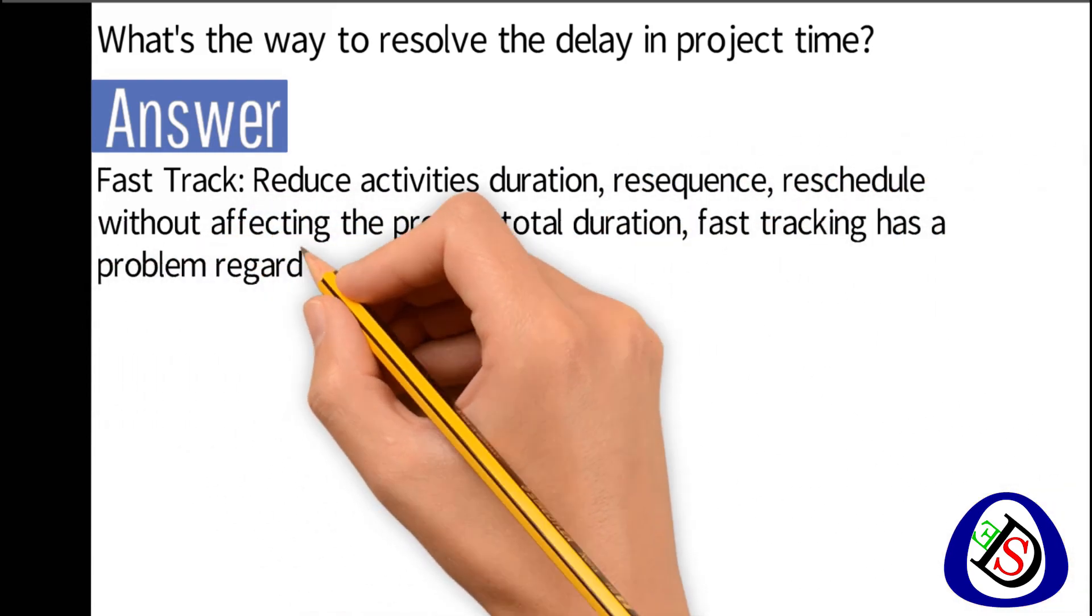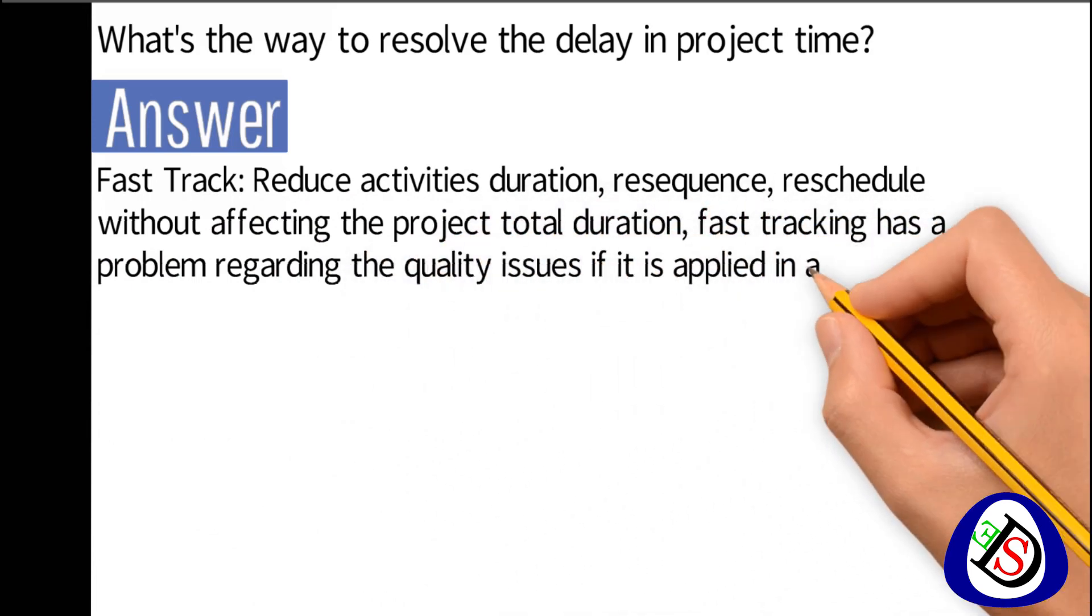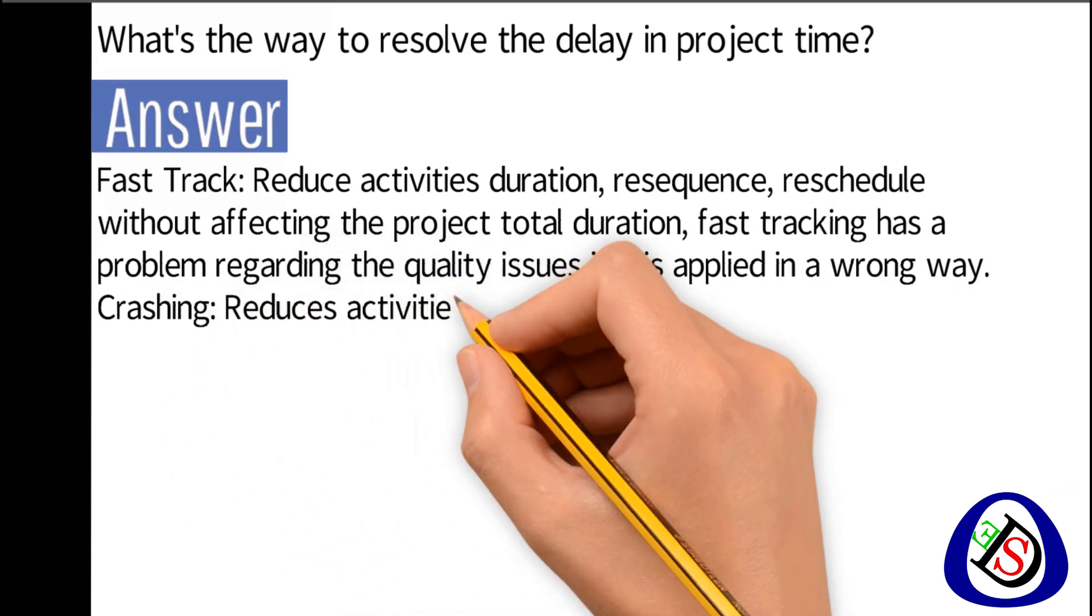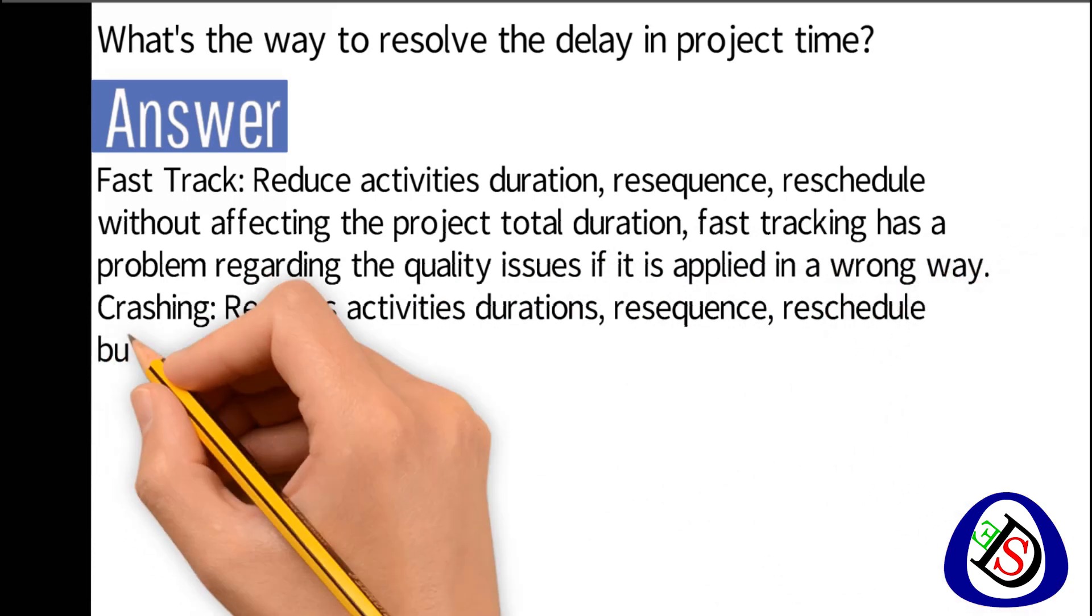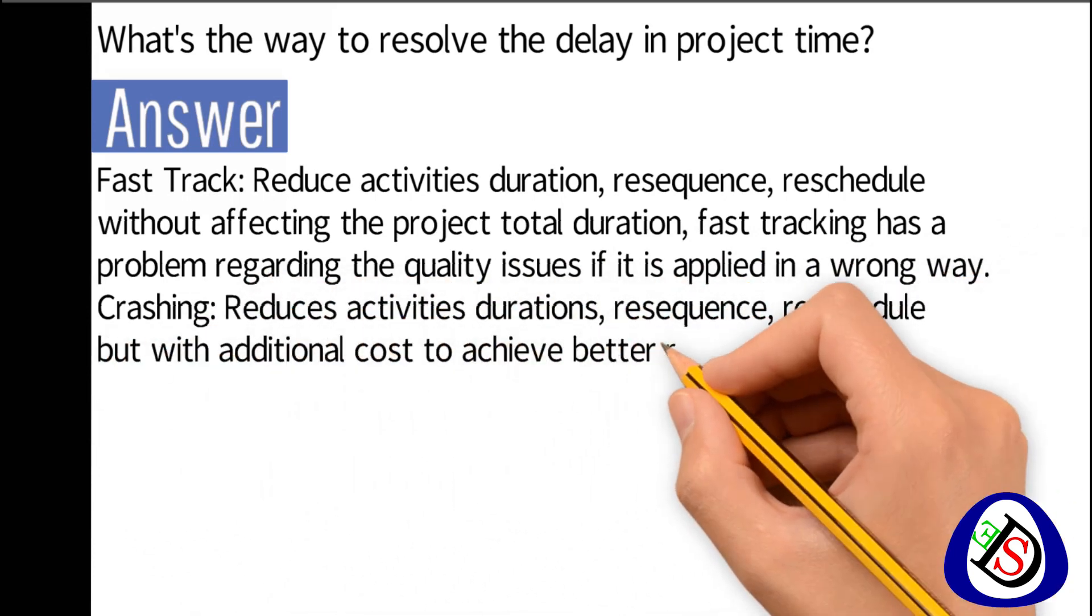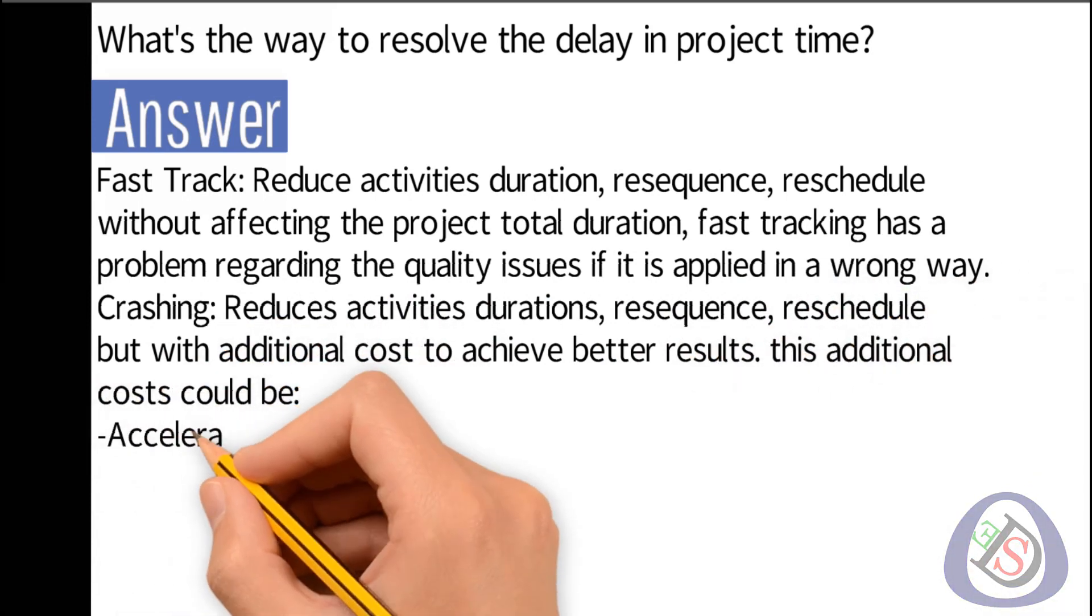Two, crashing - reduce activities durations, resequence, reschedule but with additional cost to achieve better results. This additional cost could be acceleration cost.